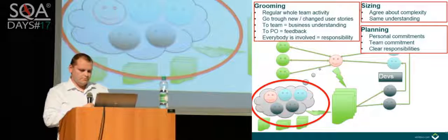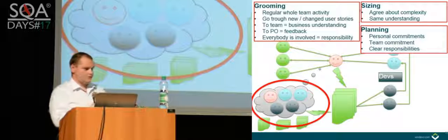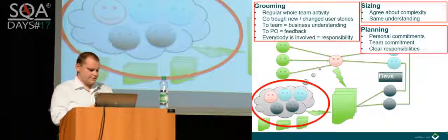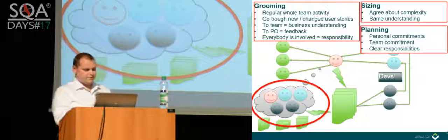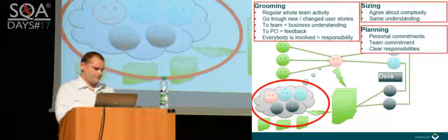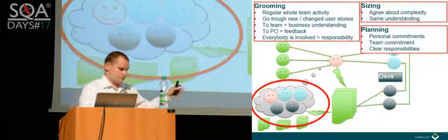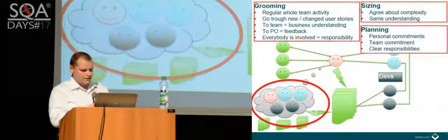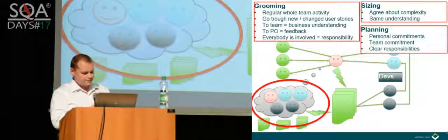And very often, story points provided by QAs and by developers are quite different. Then they need to talk to each other and explain, okay, I think this is complex because there is this risk and so on, and then developers get an understanding. Sometimes it's even the opposite: we think, yeah, easy, piece of cake, and they say, but it means reworking this and this and this and this. So we will have an agreement on how big the user story is.